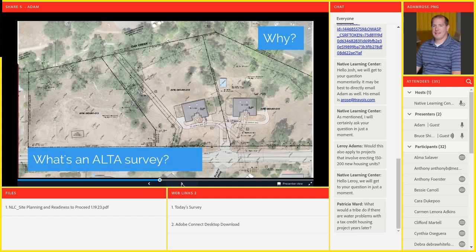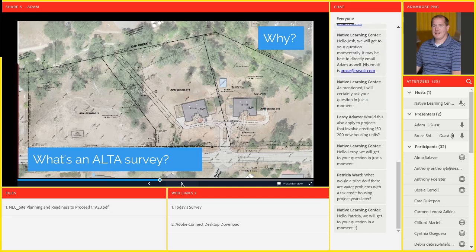Usually they're cloistered away in separate studies and reports. Yeah. So something like that, and that's where geographic information systems are really important. If you have the ability to do that, you can take all of that graphic information, put it on individual layers, and overlay them over a site plan to be able to see what can and can't be done in different locations.